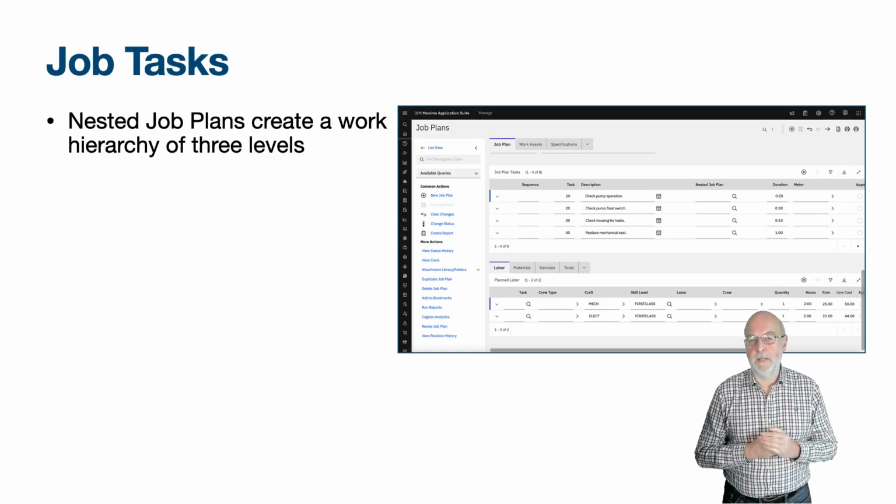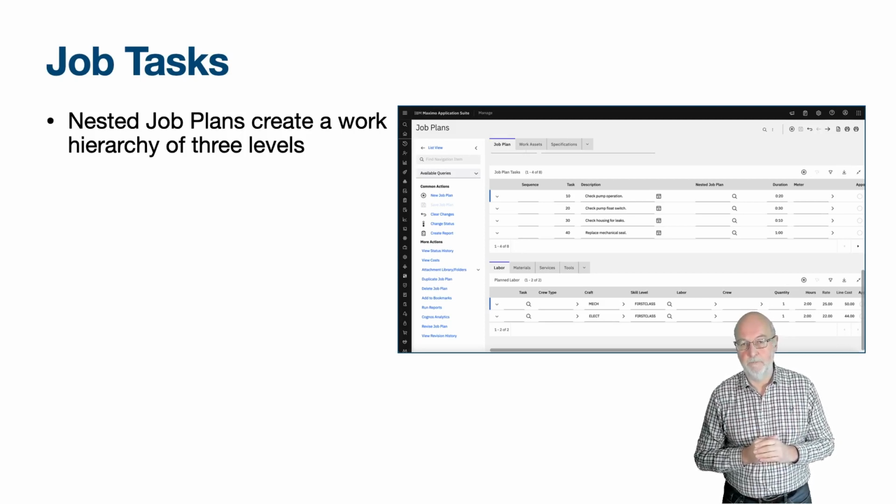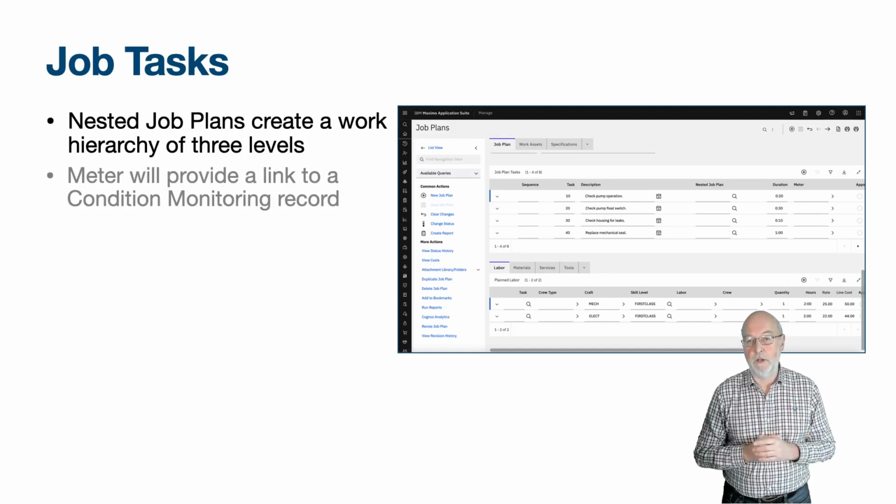Some fields used in planning and scheduling are also present on a task. Duration, interruptible, shift, appointment required, and include in schedule, which determines whether the task should be loaded into the graphical applications of Maximo Scheduler. Unless you are planning at the task level, this should not be set, as you would not want to load unnecessary records into the graphical displays.